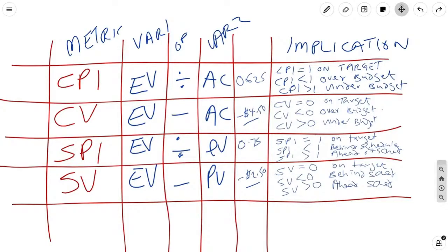And come to realize we had people who were charging to a wrong cost center. And as a result of that, it was making us look good. There was a discrepancy. We're looking too good. It should be a 1 on a level of effort type of project. But this is just one example of how valuable earned value could be when it is done the right way.